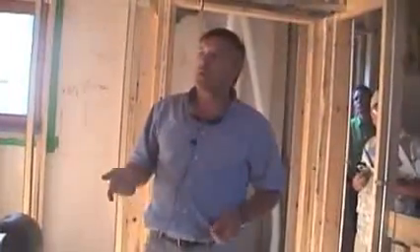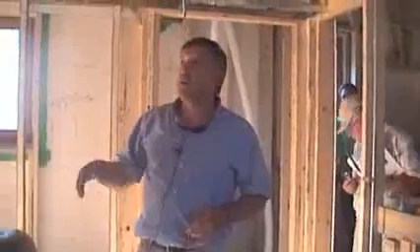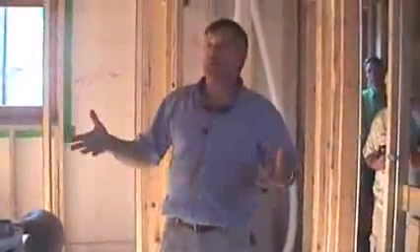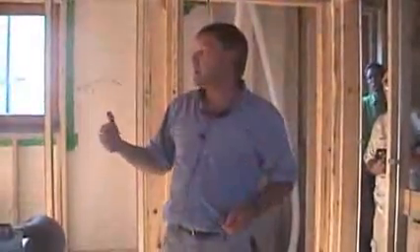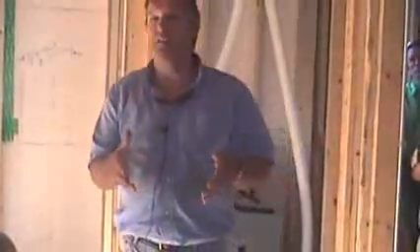the system. The most important part is the commissioning, and what we do with that is we come in, the house needs to be virtually done, doors in and all the rest, so it's in living condition. We come in and actually fire the thing up and test the flows at each one of these. We come in with a hood and we put that on each one of these supplies and returns in the house, and we actually measure the flow. And we make sure that what is happening in the house is what we designed.